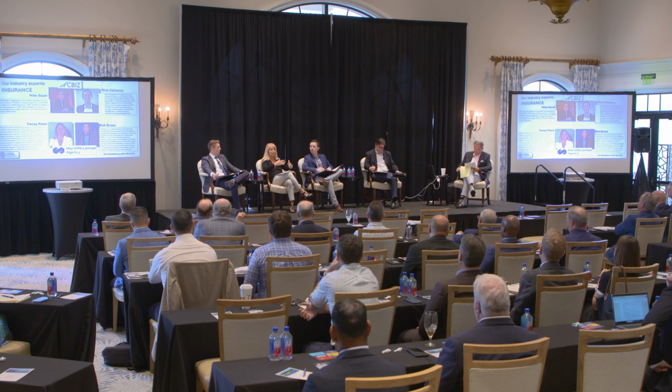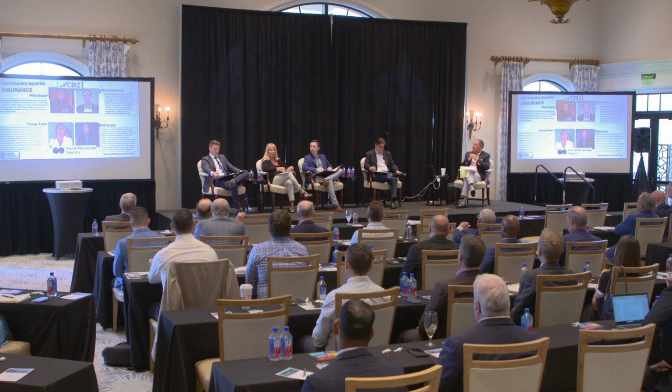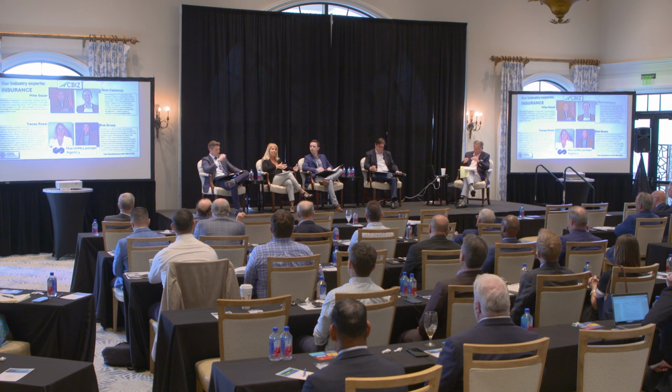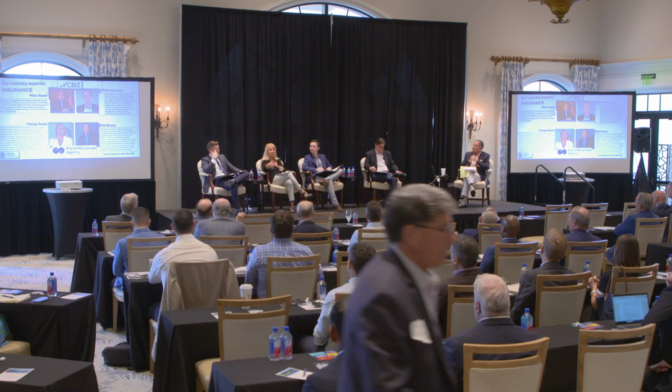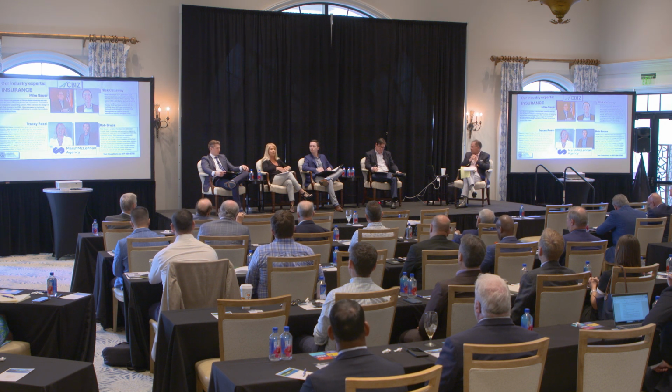So in my thought through that whole thing, we learned that's when maybe a restoration plan comes in. If you can't buy the insurance, so you can't buy a builder's risk for flood or wind specifically on a golf course, if you get told that by your broker, then maybe just make sure there is a plan in place. Maybe they were looking to obtain water trucks to come in and water. So like plan B, it isn't always going to be an insurance product necessarily. Our teams assist with risk management ideas, restoration contractors that can help. Maybe GCs can say, listen, this is what we would be able to do if that were to happen, and there would be a way to water.